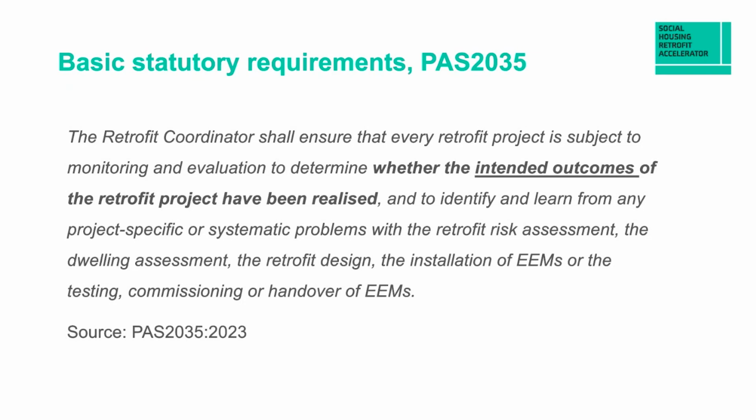Sometimes things don't get commissioned properly. So do they run a test? Is it focused for the particular property or the people that are in that property? And then handover is making sure that the residents in the property know what's been installed and how to use it, what to do if something goes wrong. You know, do I press this red button? Is that going to explode the thing? All that type of stuff. So again, we're going to cover most of these things here today.